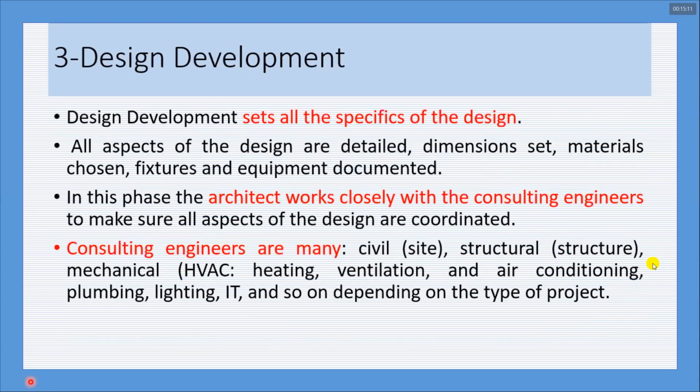Here you set all the specifics of the design. All the detailed dimensions are provided in the plans. Particular materials are chosen. Fixtures involve things like a wash basin or shower cabinet within the bathroom, or a sink area in the kitchen. All sorts of fixtures and equipment are documented, and you decide what you are going to install in your building. Here you have to work with a number of consulting engineers like civil engineers, structural engineers, mechanical consultants, lighting consultants, and so on.